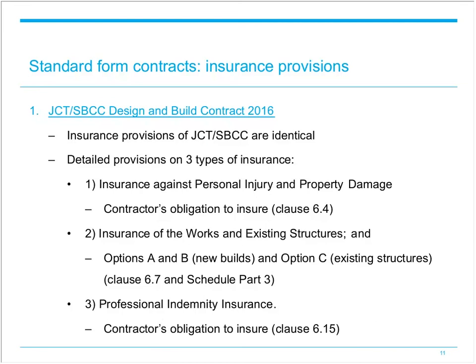Under clause 6.15, the contractor is obliged to take out professional indemnity insurance with limits no less than those stated in the contract particulars, and to maintain such insurance until the expiry of the period stated in the contract particulars from the date of practical completion of the works.